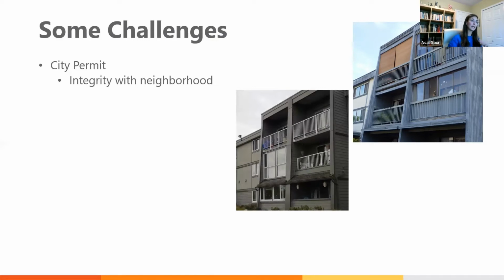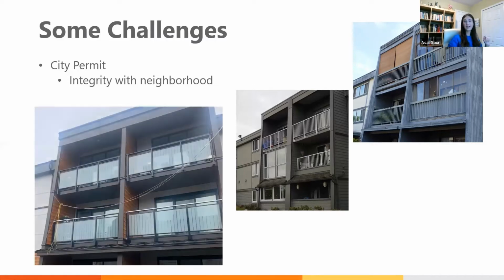That's the neighbor building that went through renovations a couple of years back. They kept the design with BCA railings. So the city was saying you must stay with the same design, and our client was not happy. After going back and forth a couple of times with the city, we came up with the idea of having frosted glass with clear strips to illustrate the pickets. I don't know if you can see in this picture. With BCA railings, finally the city approved the job. I don't know how, but we're happy that they finally approved us to proceed with the job.